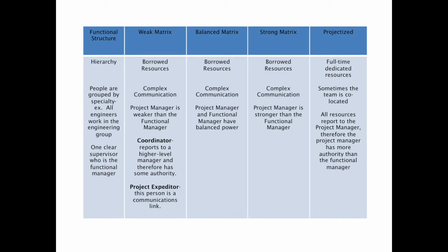In a projectized structure, the project manager often has full-time dedicated resources. Sometimes the projectized team is co-located, though not always. All of the resources on a projectized team report somehow to the project manager. Therefore, this is the structure where the project manager has most of the authority. In a projectized structure, one of the negatives, though, is the workers have no home. What we mean by this, when the project is over, there is no home for the workers or the project manager back in the organization.